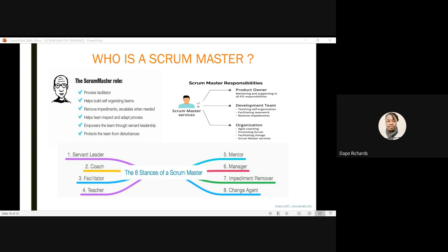Now, in a typical Scrum session, you're probably going to start a daily Scrum, saying, hi guys, let's assume you're in your forming stage, hey guys, we are here together, we are going to do this and that. There are basically three questions you are throwing out, or three things you are discussing: what has happened, what is going to happen today, and what next.